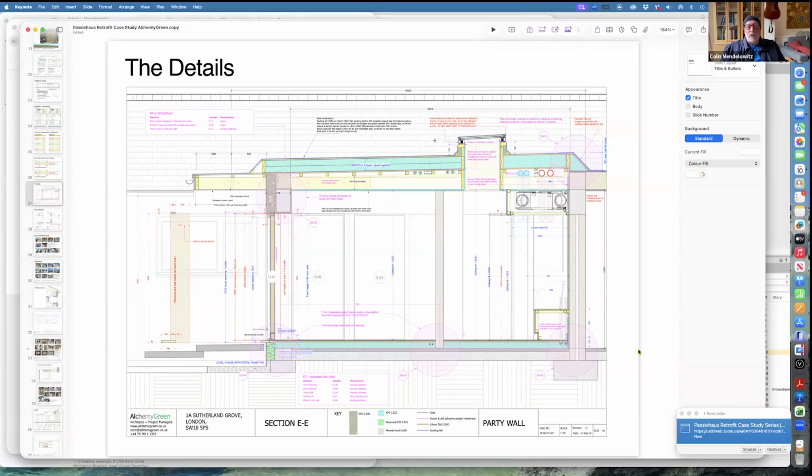But you have to do the initial air test when you're reasonably sure that you've got most bases covered. The big one in the first air test was that the person doing the test didn't block up the MVHR's vents. I spoke to somebody about that, and they said schoolboy error.